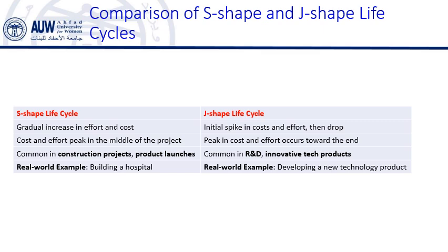While on the other hand, the J-shaped life cycle has a slow initial progress. Projects following this life cycle often begin with limited visible progress. Early phases, such as research, feasibility studies, or design, take considerable time, and here the uncertainty will be very high. This is followed by a rapid acceleration as the project reaches key breakthroughs, such as successful trials or the completion of the prototype.